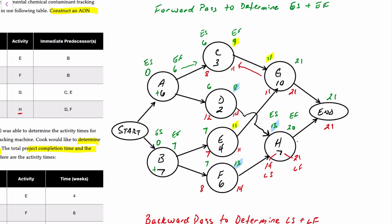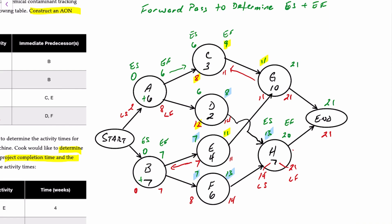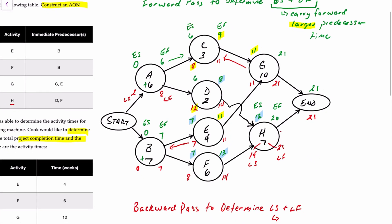For activity B, which precedes both E and F: we take the smaller of the latest start times — E's latest start is seven and F's latest start is eight — so we bring back seven. Seven minus seven is zero. For activity A, preceded by C and D: we take the smaller number back — eight minus six is two. So the latest A can start is two weeks and the latest it can finish is eight weeks. The rule of thumb: in a forward pass, carry forward the larger predecessor time; in a backward pass, carry back the smaller successor time.